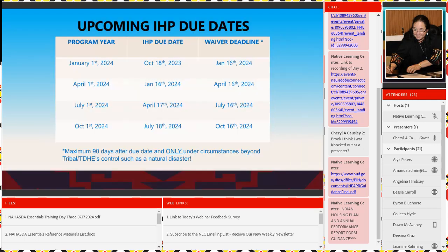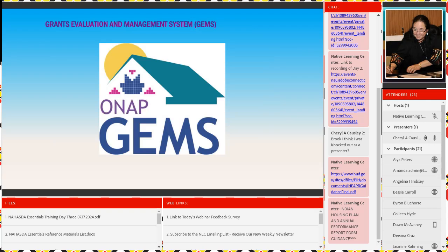So these are the due dates. July 1st, 2024: the due date was April 17th, and the waiver deadline, July 16th. So if you were in that situation, you have now passed go because today is the 17th. October 1st, 2024: due date's July 18th, okay, means it's due tomorrow. Your waiver deadline's October 16th. Maximum 90 days after the due date, only under circumstances beyond the tribe or TDHE's control, such as a natural disaster, or they understand your executive director is not there.